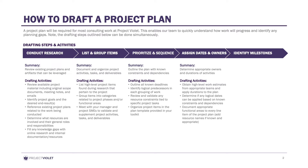Next, we're going to assign due dates and owners. Add due dates and owners to each line item in the project plan. You can derive the due dates based on the time constraints you've incorporated. For your initial projects, you'll likely be the owner for most of the work, but you can also include additional context of resources you think you'll need to support you.